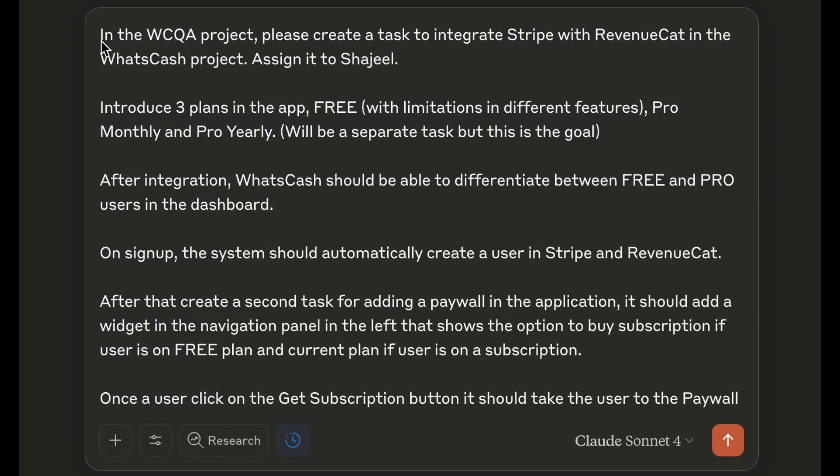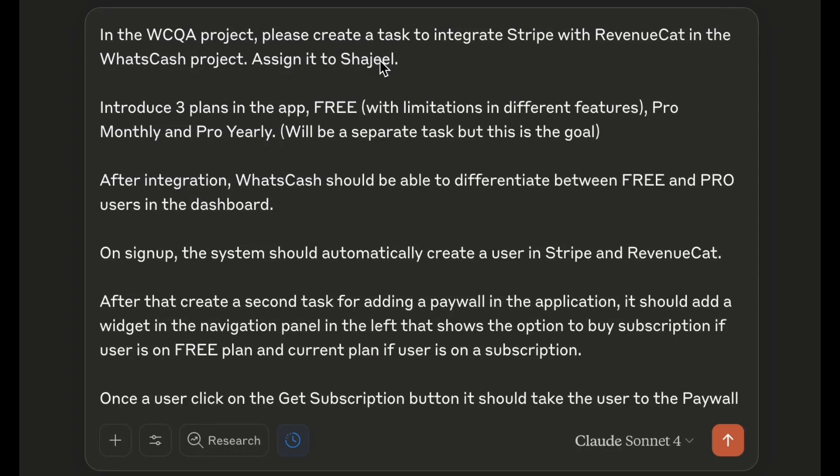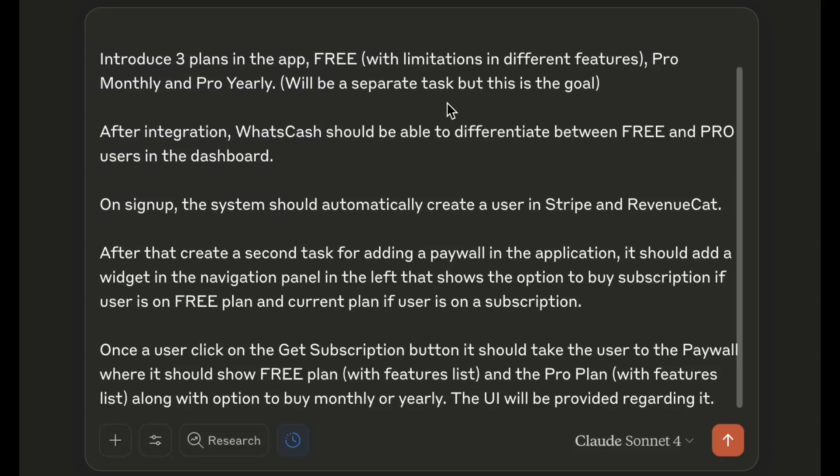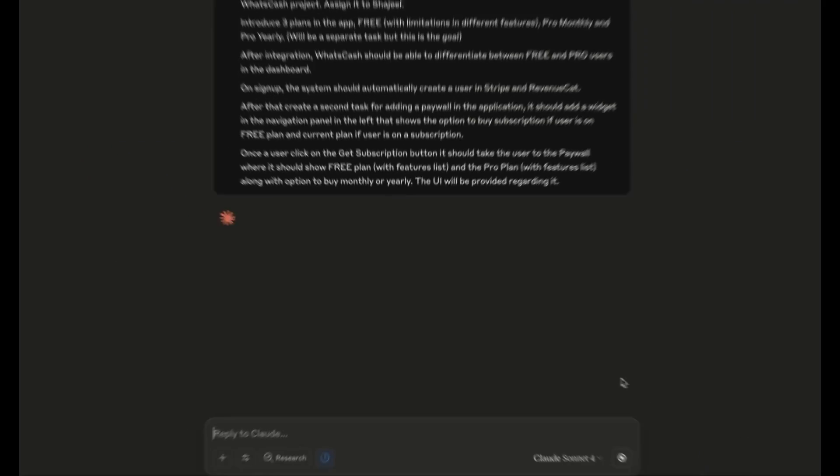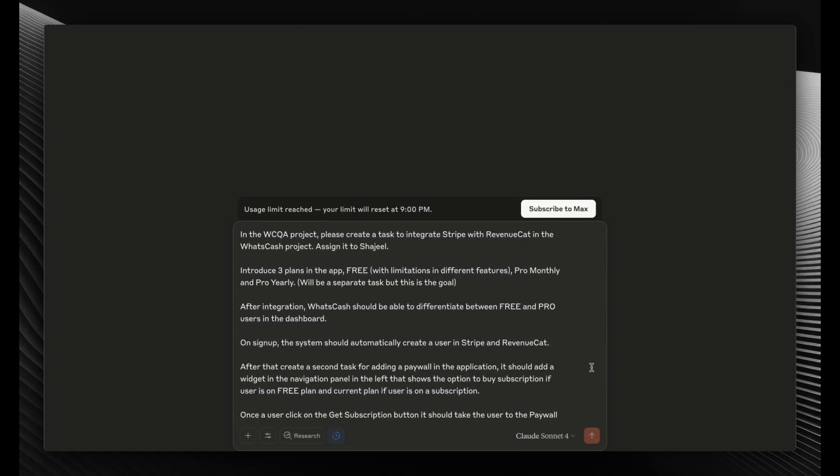After that, create a task for adding a paywall in the application. It should add a widget in the navigation panel. So as you can see, I'm describing it to create two tasks, and the second task is dependent on the first task. Specifically, I'm saying assign it to Sharjeel, meaning it should understand who the team members are in my project and assign it. Let's click send and see if it works.